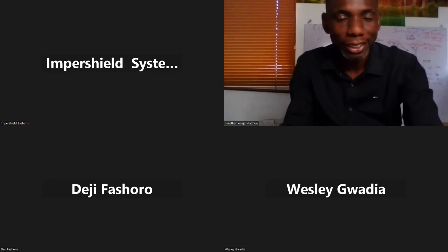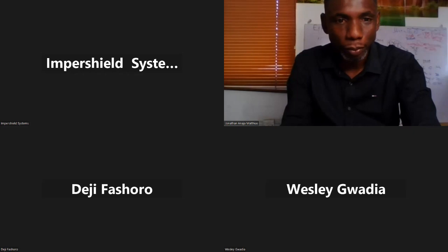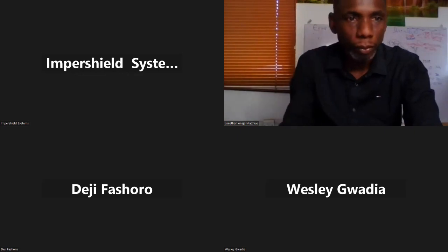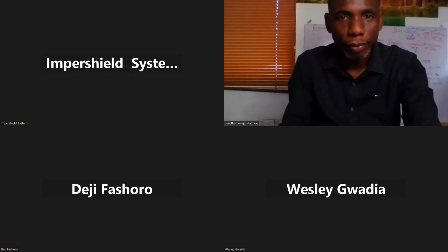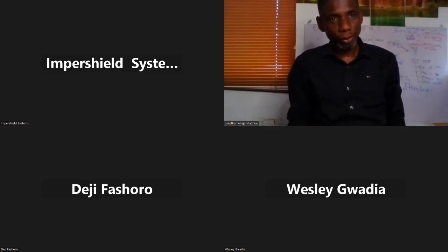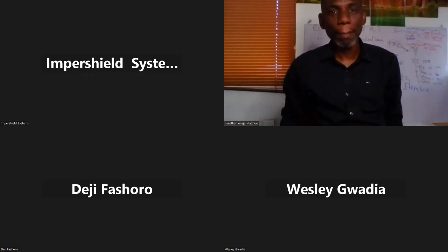So WBS, what I got from the class, it's important to understand your WBS, because if you don't understand it, you will not be able to make proper estimations for your project. It involves breaking down your project into small bits, and the smallest bits of your breakdown is what we call our work package. Until you get to the work package, you need to continue to break it down.